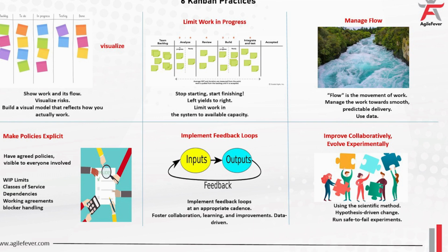So I saw there is one statement written: WIP limits and policies still cannot surpass the importance of work prioritization, which defines the work that needs to flow through this workflow. Yes, there are some techniques, and one of them is class of service. We can have a lot more discussion on how we can use class of service to do the prioritization of the work. Instead of going into too much detail, I'll just say that if some important work comes in, we can, based on our policies for the class of service, work on those expedite, emergency or urgent things. Yep. And we will take the questions at the end.